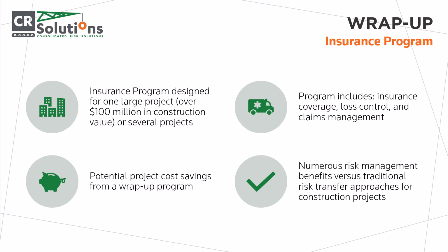Here's a brief technical description of a wrap-up insurance program. It is a risk management and financial product that provides greater control over construction exposures for a large-scale construction project or projects, which are usually over $100 million in construction value. The sponsor, which could include the owner, developer, or general contractor of the program, purchases an insurance program, also known as a wrap-up. These programs include insurance coverage, loss control, and claims management services on behalf of themselves, the construction manager, general contractor, and all the subcontractors.